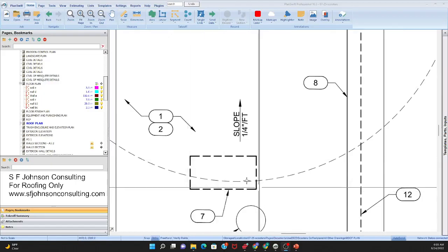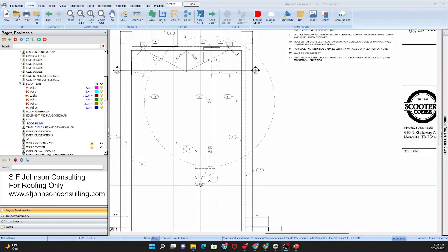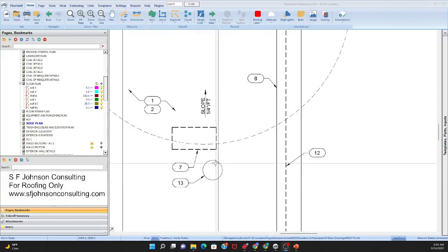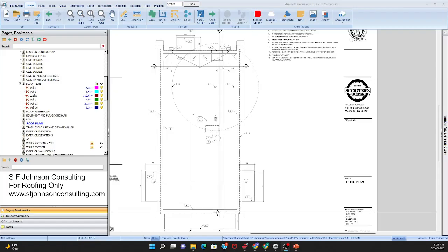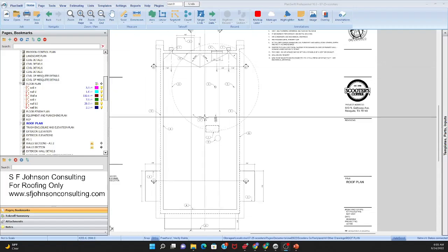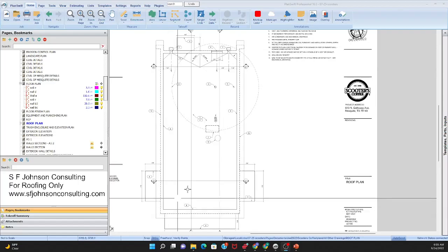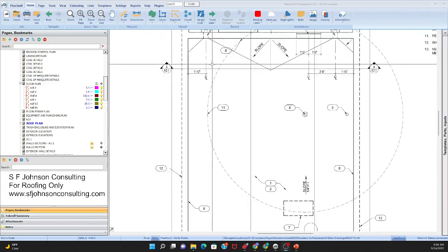And for the roofer, besides square feet of the finish, always determine how many square feet of opening we have. This is an opening for a rooftop unit or condensing unit or something like that. It's a circle, so we just square it out, because we do want to give the roofer how many square feet of opening, because they're going to deduct that from the total area of the roof if they want to. So, area of the roof, perimeter of the roof, because we're going to have to look at a section view to determine the parapet height.